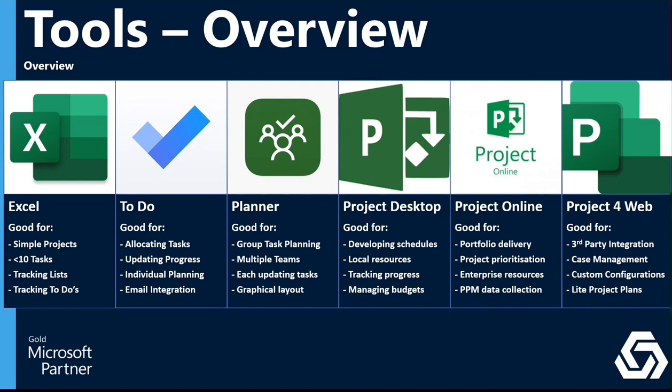Ooh, okay. Microsoft don't do us any favors here, Lisa, in terminology. So if you're using Microsoft Project Desktop, as in you've got a single MPP file stored on your documents, for example, you can't then go and share that via Project for the Web. You could use Project Online to publish that plan into Project Online and then share that schedule with other users. But you hit limitations.